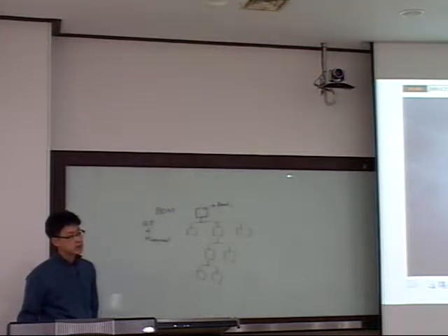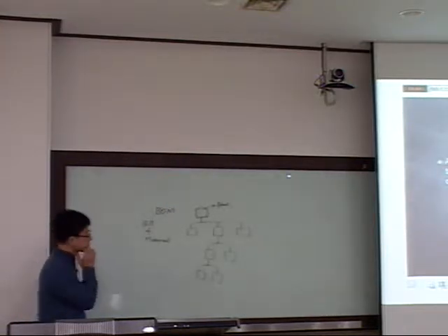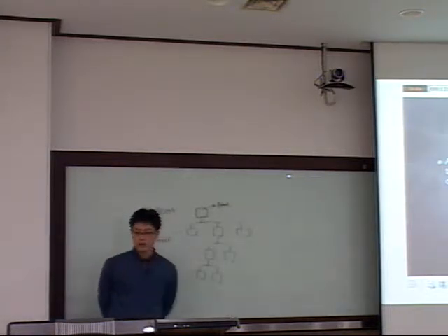And sometimes it is and sometimes it isn't, but usually this vertical location, for example, B, C, D, E are at the same location vertically, and this vertical location means the level of the product. So sometimes in shipyard, if A is a ship, B, C, D, E level means grand blocks, and F, G, H level means sub block or something like that. Okay. The other thing is work breakdown structure.